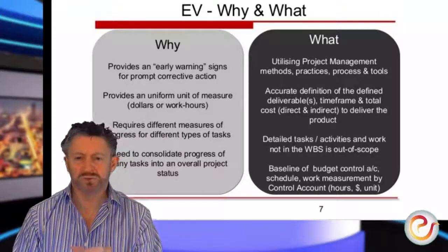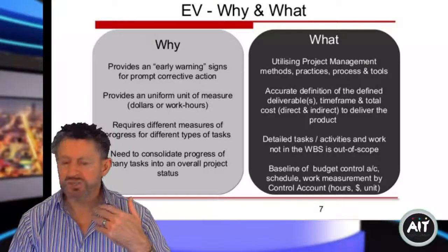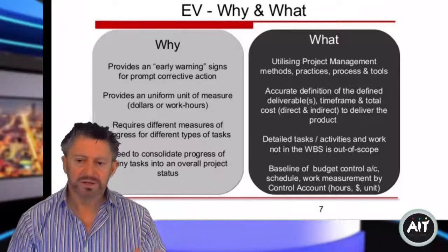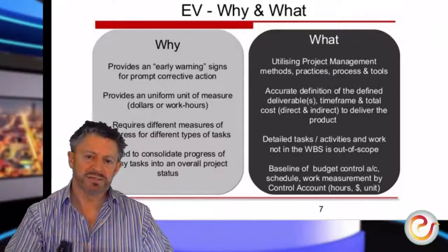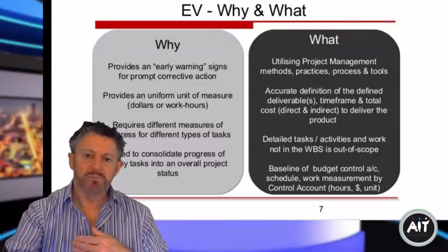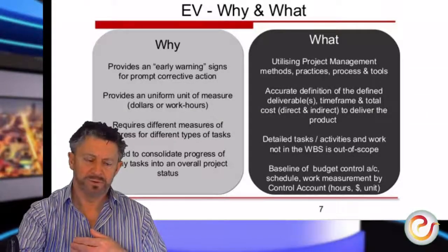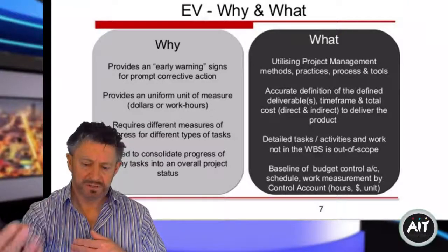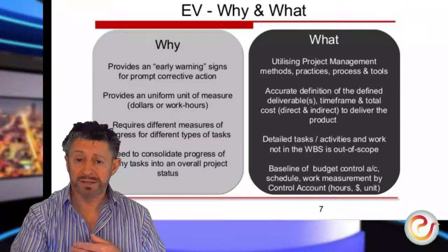Now in very large projects, if you're building a bridge or a shopping center or something like that, then you will probably separate out these costs, but they're exactly the same. So the time for labor and the time for machines multiplied by the hourly rate. So if you have to hire equipment to build a bridge, you can break it down as to how much it's costing me per hour or per day.